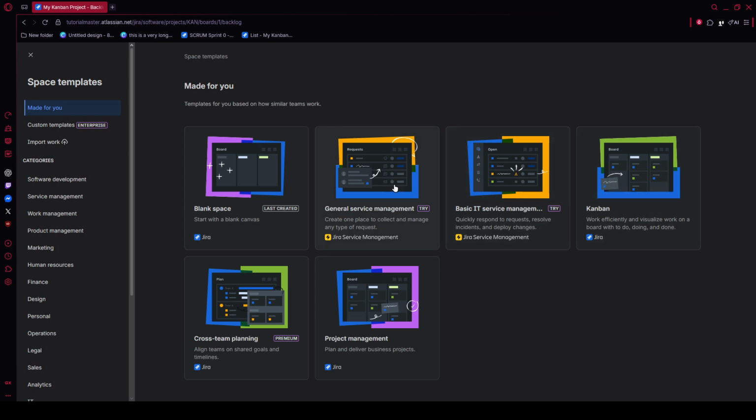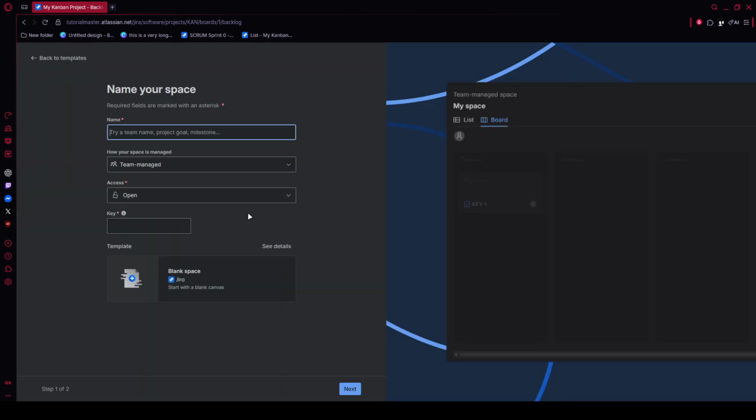Inside that window, start by choosing the correct project from the project dropdown. This is important because it determines where the issue will live. Right below that, select the appropriate option from the issue type dropdown. Depending on what you're reporting, this might be a task, a story, or a bug. Choosing the right issue type helps your team sort and manage work more effectively.